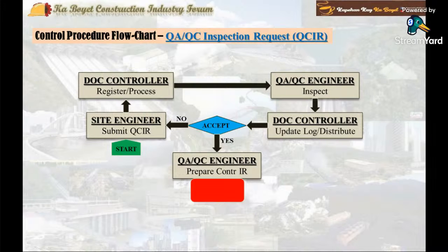Important note, for any repeated failure of inspection which adversely affects the progress of work, the QC engineer shall inform the general manager and or the project manager or project in charge of the project for a corrective action or conduct investigation or improvement training.